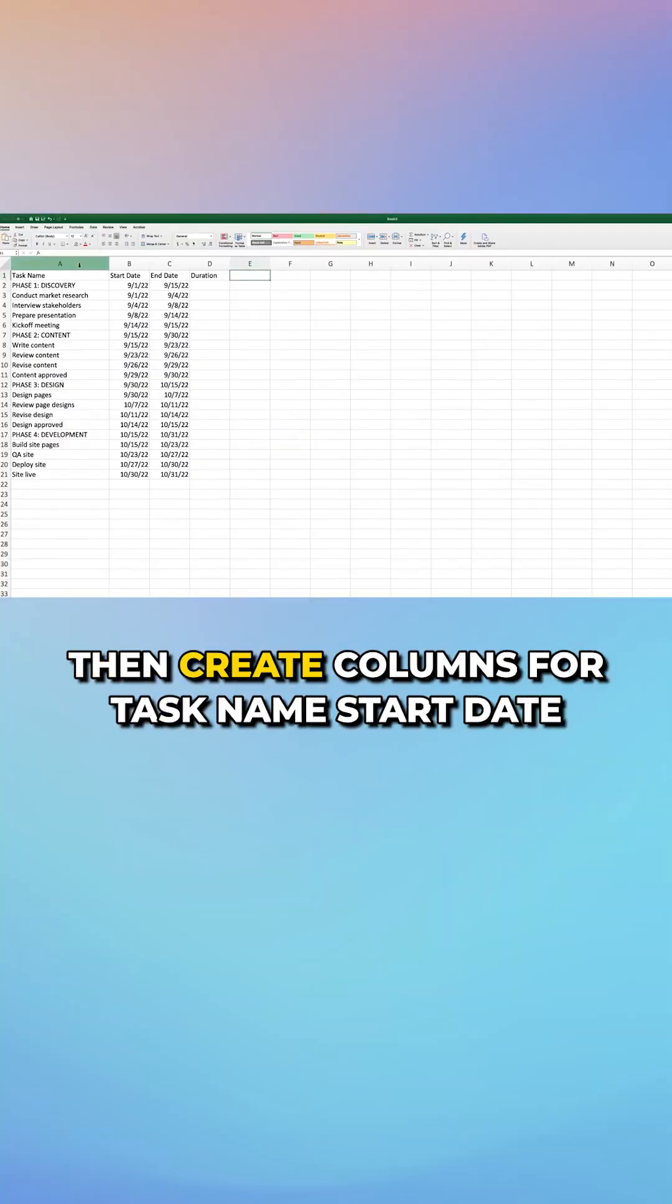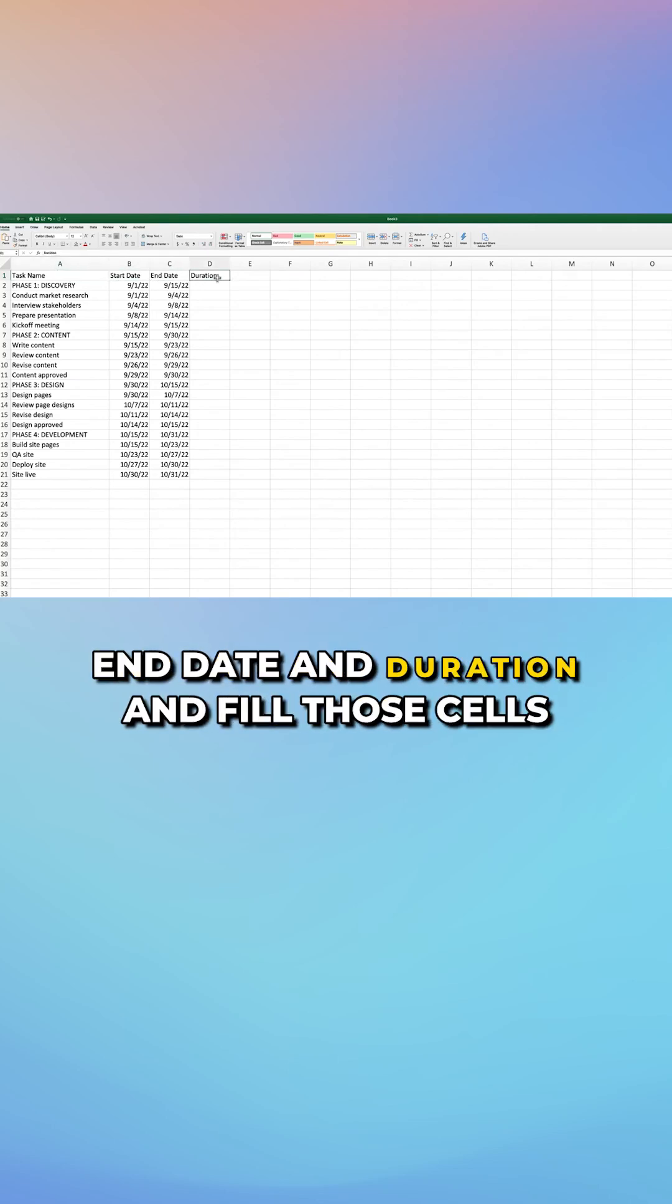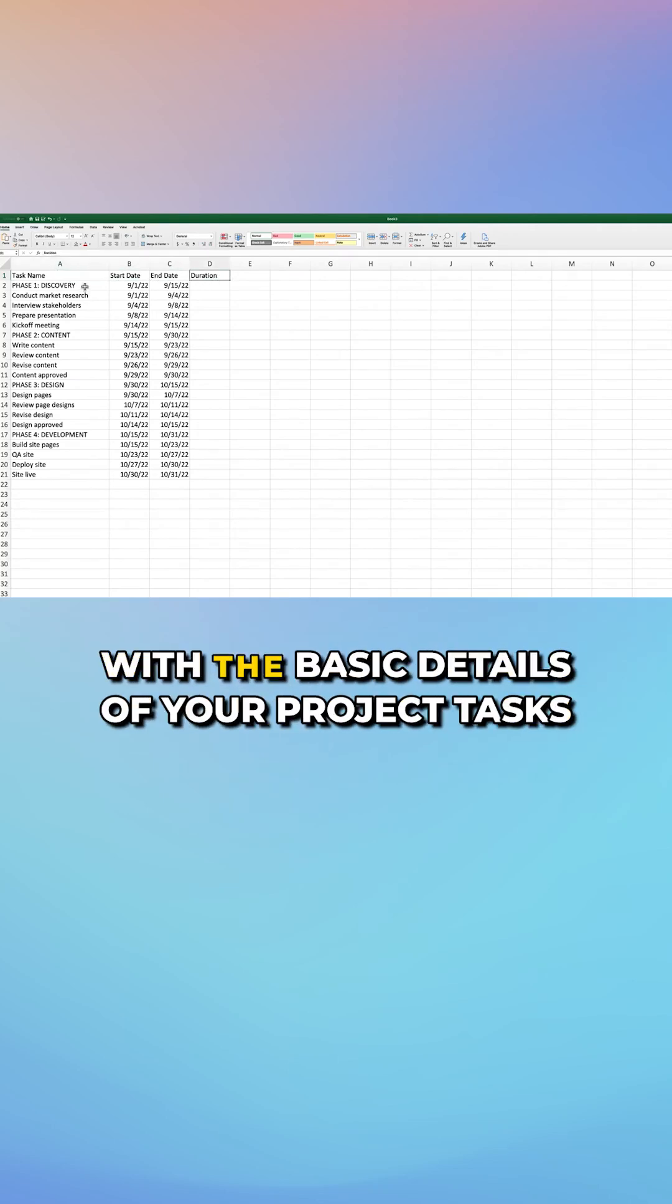Start with a blank spreadsheet in Excel. Then create columns for task name, start date, end date, and duration, and fill those cells with the basic details of your project tasks.